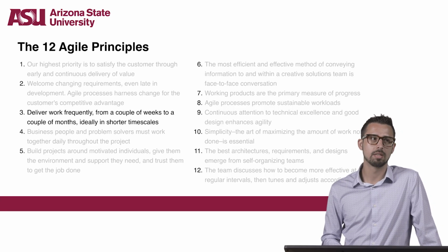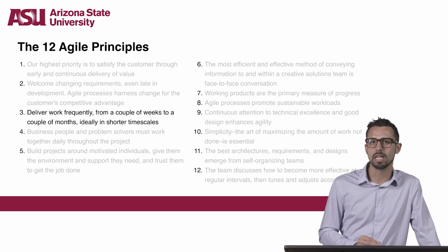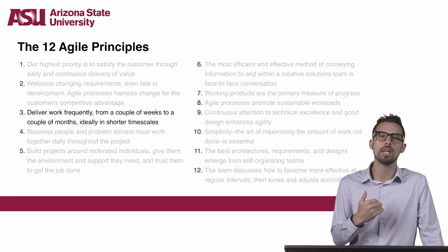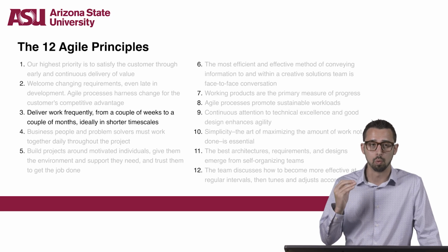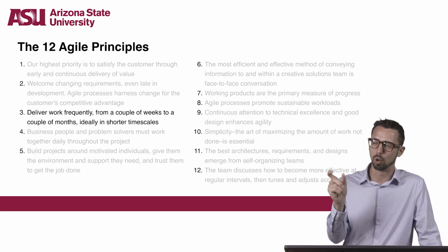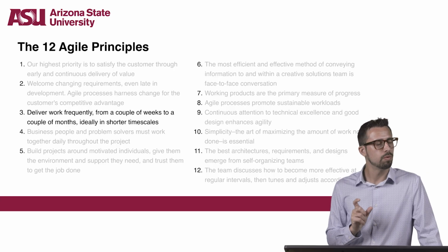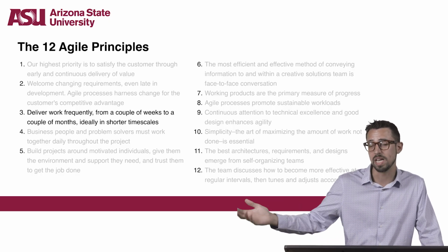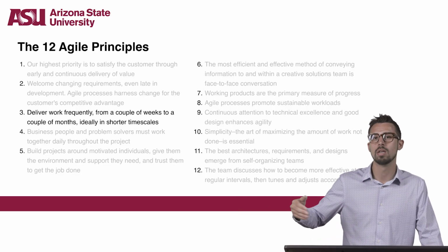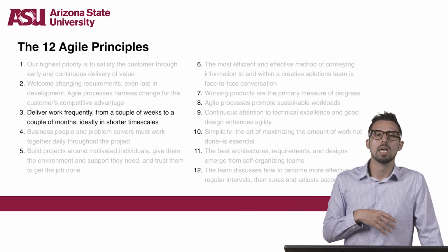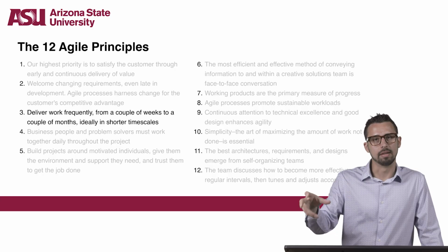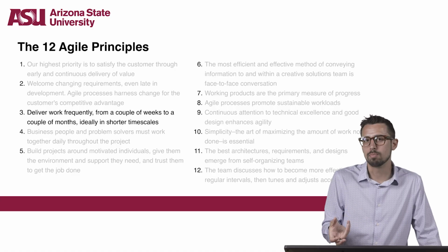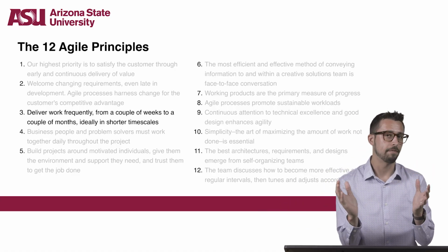Agile projects really plan for frequent, very short, often 2-week timelines that allow for a fast turnaround of a workable product. That's really important. They're workable products. Teams will often break Agile projects into one, two, or four week-long sprints or project intervals, each one ending in the delivery of a product. That's really important there. If your product needs more time, then you need to set longer sprints. It doesn't have to be a 2-week sprint.